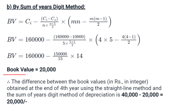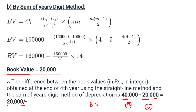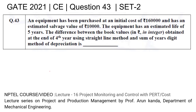By putting all the terms into the sum of years digit method formula, the book value at the end of the fourth year comes out to be 20,000 rupees. The difference between the two book values is: 40,000 (straight line method) minus 20,000 (sum of years digit method) = 20,000. So our answer is 20,000 rupees.